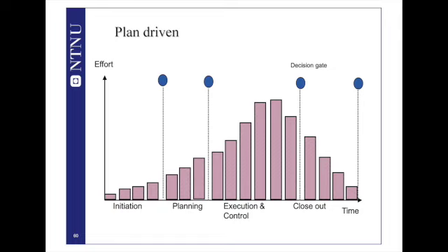So what characterizes a plan-driven approach actually? First, as you can see, the amount of work at the beginning is very low. And this amount of work increases gradually. You start with the initiation, this is a little work, and when you do planning, you put in more resources, and when you come to the execution, this is the highest amount of work. So low, higher, higher, higher, very high, and then it starts to decrease gradually.